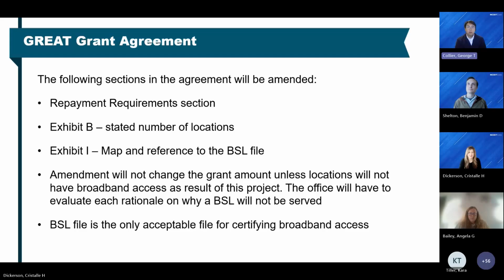that we agree upon. I think it's very important to note that the amendment will not change the grant amount unless there are locations that will not have broadband access as a result of the project. We'll have to evaluate, the office, your assigned project manager, myself, Ben, and really the greater office will have to evaluate each rationale on why a BSL will not be served. And just to note, once we incorporate the BSL file we are providing into our grant agreement amendment, that BSL file is the only acceptable file for certifying broadband access.